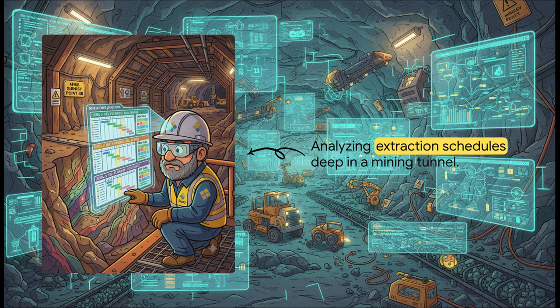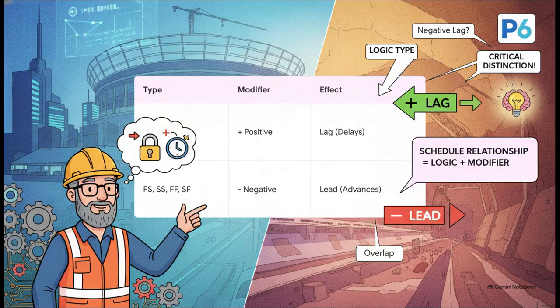Both Oracle Primavera P6 and Microsoft Project set a massive trap for us. They put lead and lag values into a single data field that is almost always just labeled lag. So even when you're entering a lead, the software calls it a lag. This is the root cause of the industry's language problem. So we have to look past the field name and just break down the math.